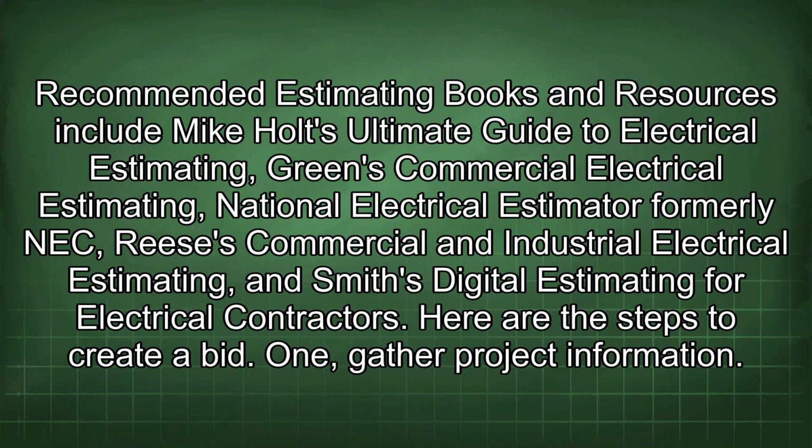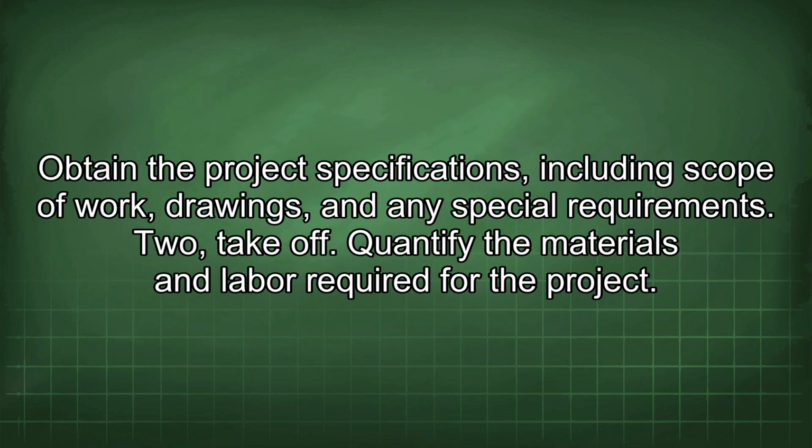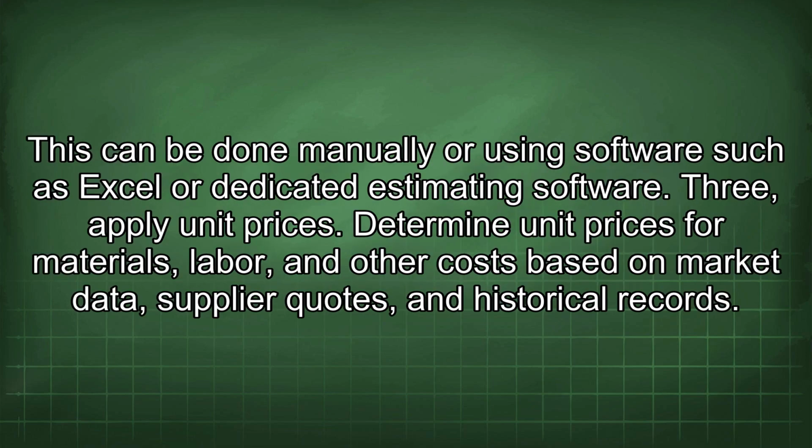1. Gather project information. Obtain the project specifications, including scope of work, drawings, and any special requirements. 2. Takeoff. Quantify the materials and labor required for the project. This can be done manually or using software such as Excel or dedicated estimating software.